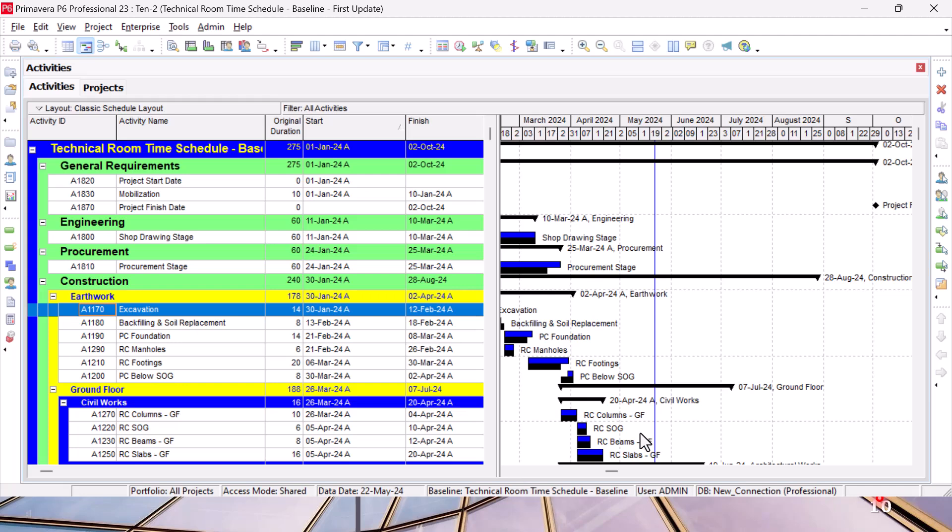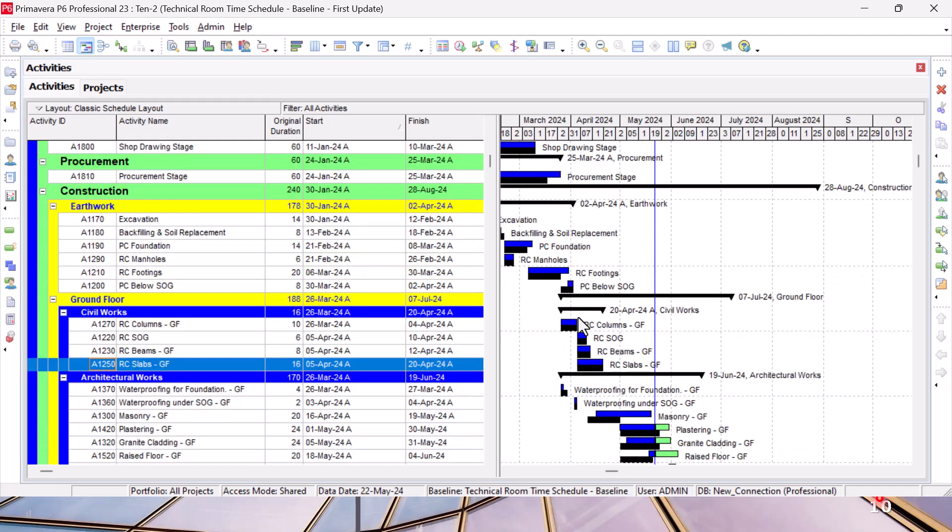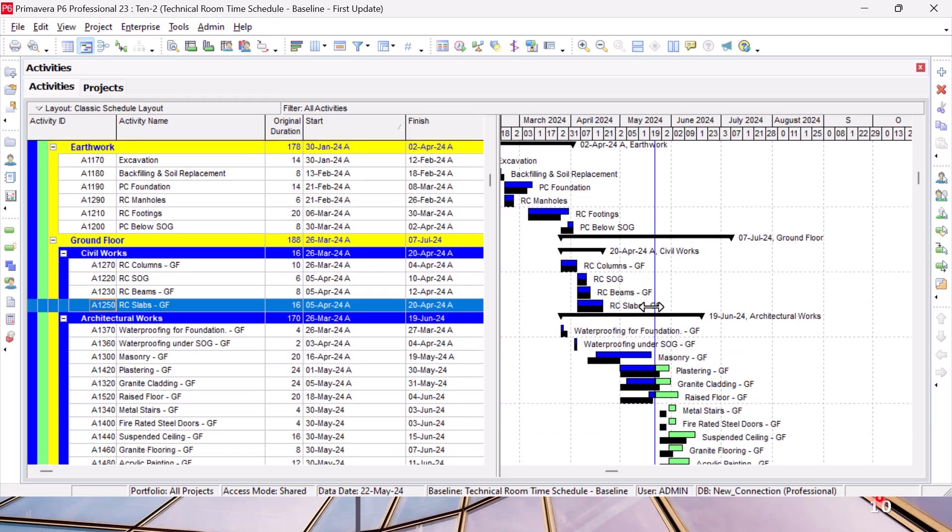Let me shrink the bar chart a little bit. From one look I can tell these activities are started and finished on time. This activity finished a little bit late because this bar is after this bar. This activity is starting very late.